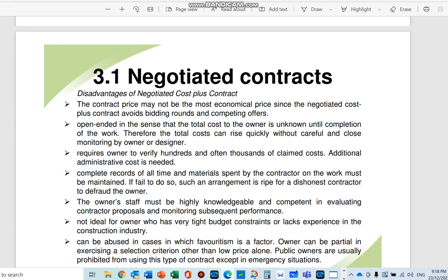And then you've got IEM, Standard Form of Contract. These forms are very standard. They list down all the contractual administrative clauses, but they are not specifically applicable for maybe cost plus or remeasurement or full remeasurement. They'll generally be okay for lump sum, fixed price, provisional lump sum, that sort of contract.